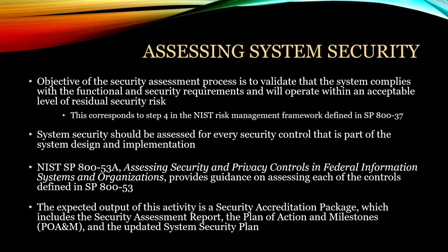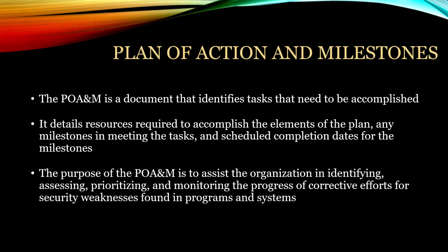Plan of action and milestones. When we are doing any form of plan of action, it's documentation that identifies tasks that need to be accomplished and breaking them up into milestones or areas that you can actually achieve. So this is also going to include a metric for achievement. If you have a giant project and you break it into 5 milestones, each milestone is going to be completed and the measurement that you're going to use to verify.